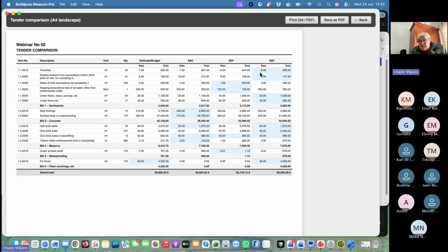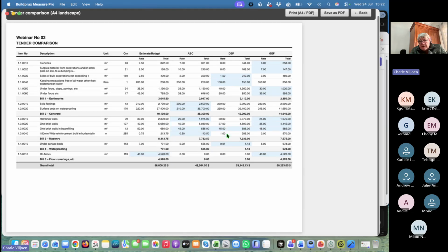listen, is there one that is popping out? Is there somebody that is, why is it so cheap? And if you see, okay, yeah, it is generally in there. And here you can see this guy has priced 2. My budget was like 2.5 maybe. But why did this guy price for keeping water so cheap? And you can quickly check by running through your document, like if there was a mistake.